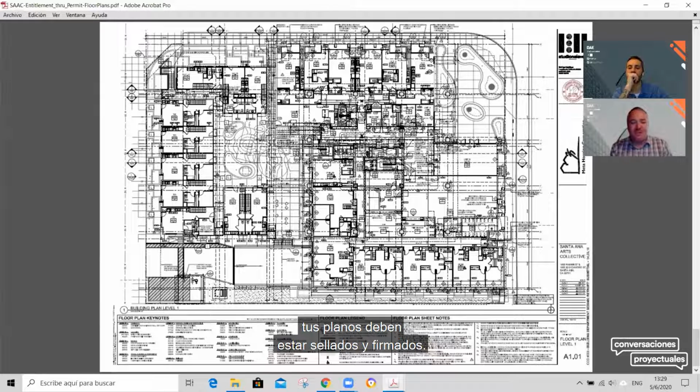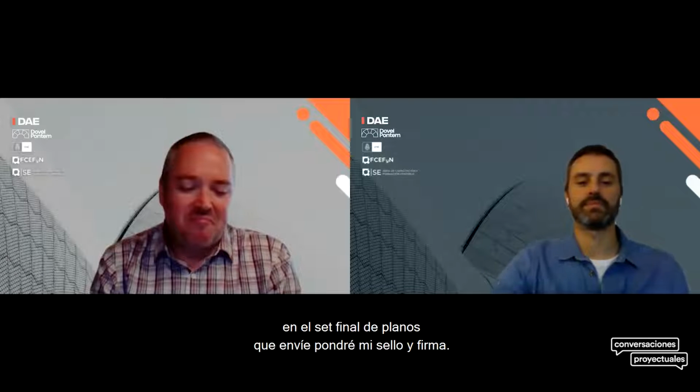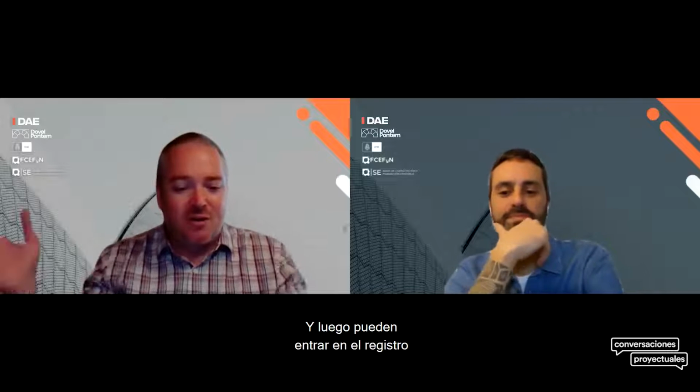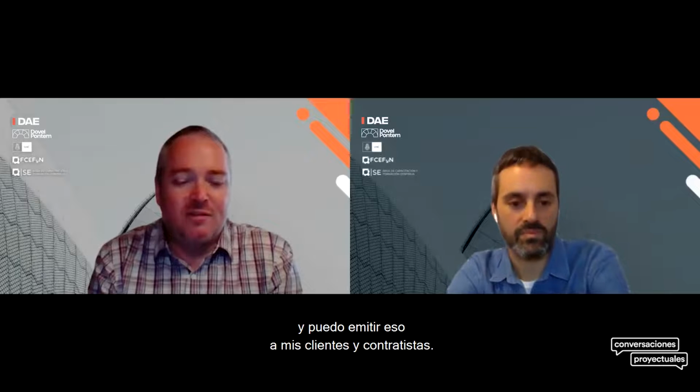Sometimes the city will say that for your first submittal, your plans must be stamped and signed. I go into that city and I'm willing to take that as a plan check correction. They won't reject your plans, they'll just make it a plan check correction: before I give you a permit, you must have a stamped set of drawings. And I say, well, when you stop giving me comments on my final set that I submit to you, I'll stamp and sign it. Then it can go into record and I can issue that to my client and my contractor.